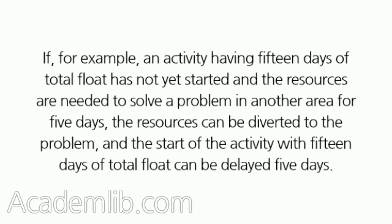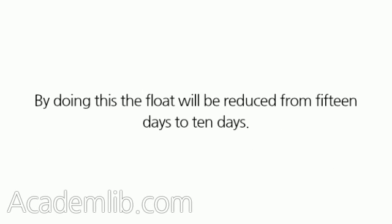For example, if an activity having 15 days of total float has not yet started and the resources are needed to solve a problem in another area for 5 days, the resources can be diverted to the problem, and the start of the activity with 15 days of total float can be delayed 5 days. By doing this, the float will be reduced from 15 days to 10 days.